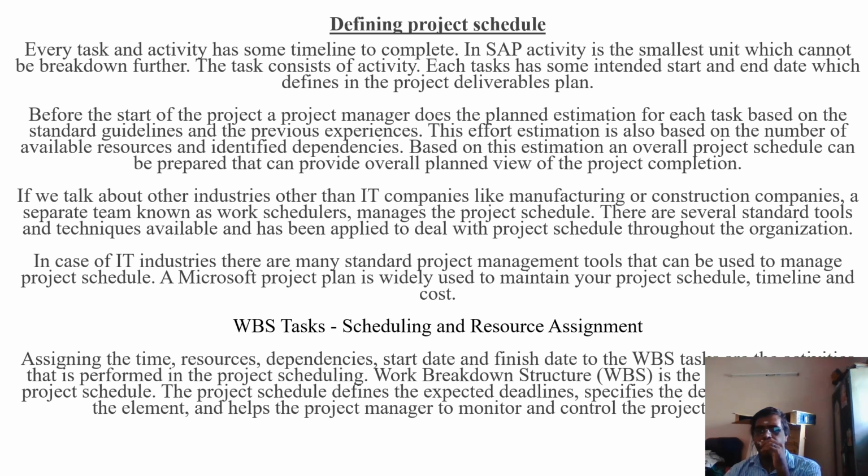In SAP, an activity is the smallest unit, which cannot be broken down further. The task consists of activities. Each task has some intended start and end date, which defines the project deliverable plan.